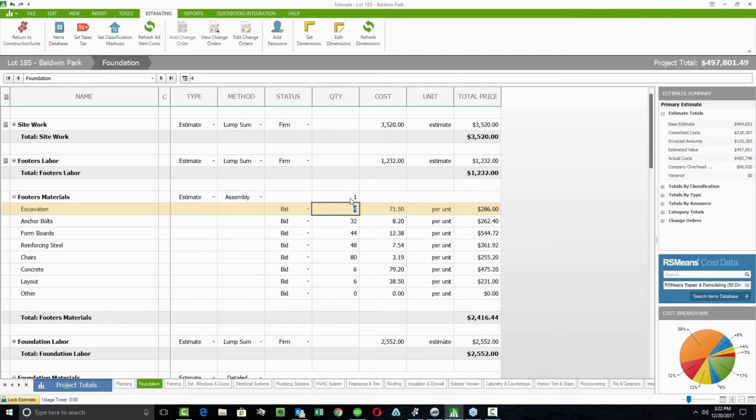I find that this is extremely beneficial for anybody who's working within these pre-packaged units. So I see a lot of it for companies that do specialty work or subcontracted work, or even companies that just try to use the same sort of structure or wish to speed up their process. In fact, we've got one home builder in Australia who's used a combination of assemblies and custom cost books to create an estimate that takes about 15 minutes to completely generate a full estimate from scratch.